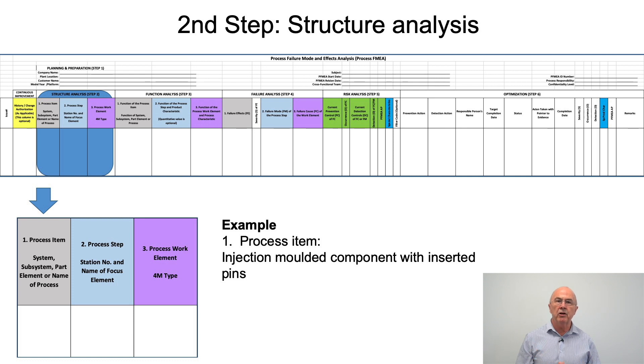Now let's have a look at the second step structure analysis within the framework of the format to record the FMEA results. In this case we have three parts of the form to complete: the process item, the process step, and the process work element. Focusing on the case study, the process item would be the finished injection molded component with the inserted pins.